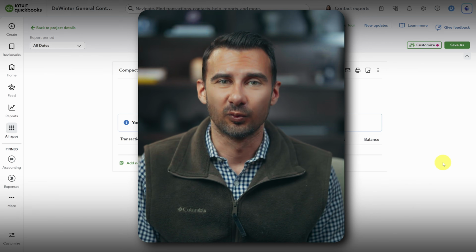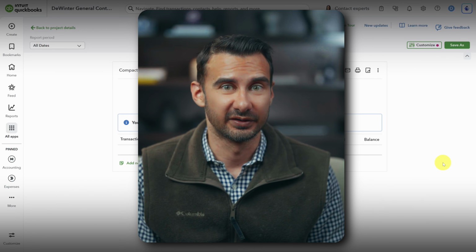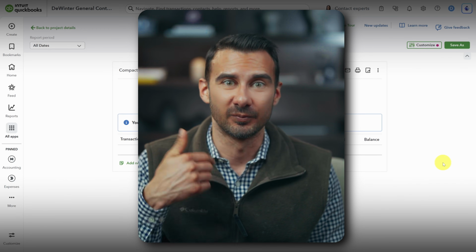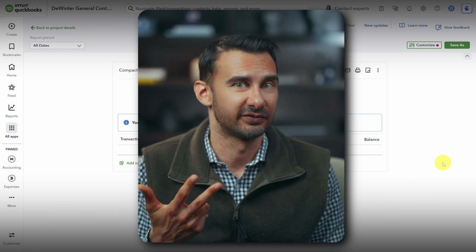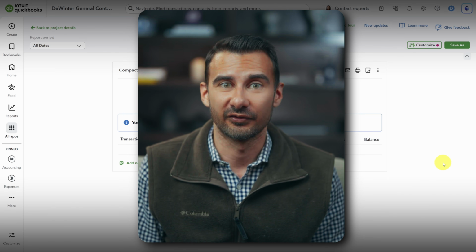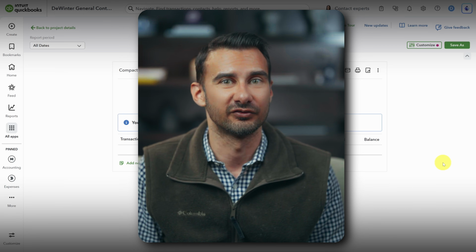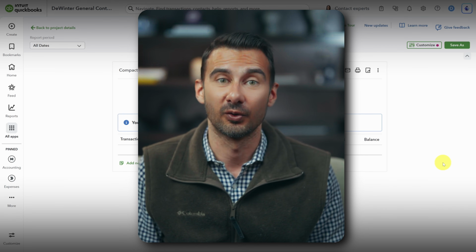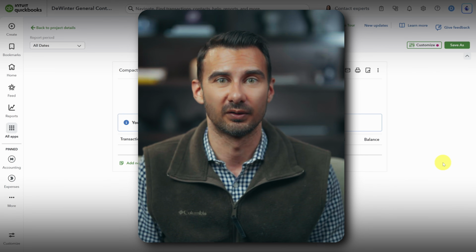These reports only work if your data entry is disciplined. Every hour needs a project, every bill needs a project, and every invoice needs a project. If you clock in without selecting a job, the labor cost has nowhere to go and won't show up. So it's imperative to train your employees well.